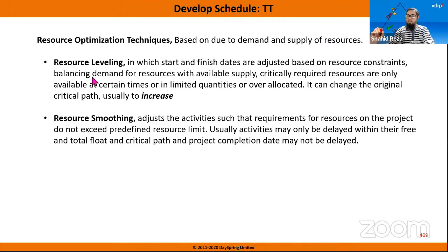That's why if you do resource leveling, generally it increases the project schedule, because it tries to find out when the resource is free. All right. So if there is no free slack or float, then it tries to shift the project schedule. The schedule will be increased, extended, expanded. So that's why management does not always agree with the resource leveling thing.